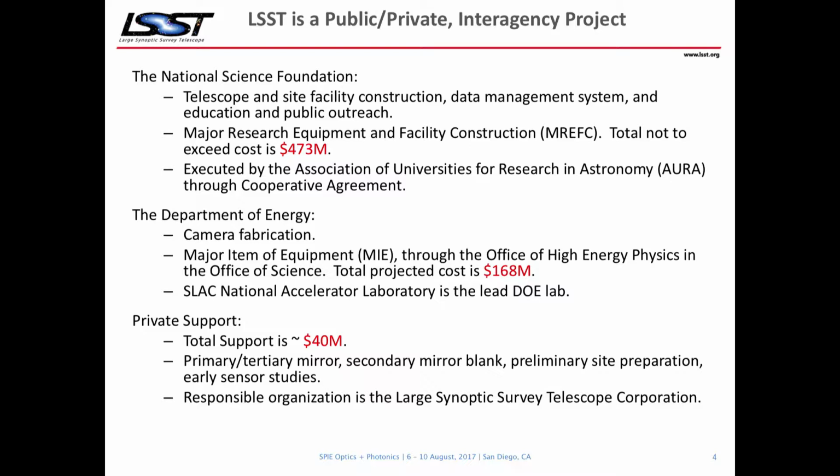So this is a complex programmatic project as well. It's a public-private interagency project. The lead agency is the National Science Foundation, which is funding the development of the telescope and the site, as well as the data system. This is called a Major Research Equipment and Facility Construction Project, an MREFC project. And we were approved with a total not-to-exceed cost of $473 million from the NSF.